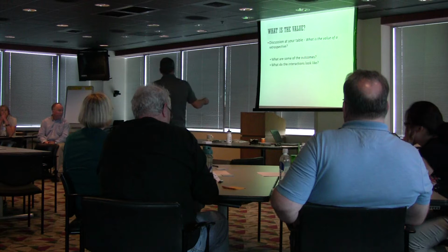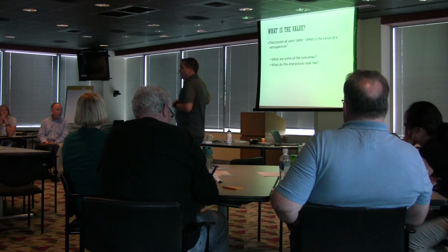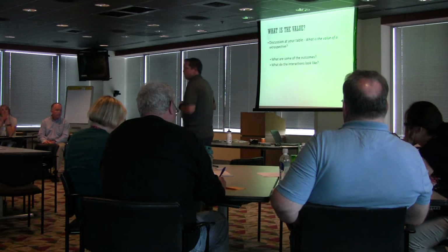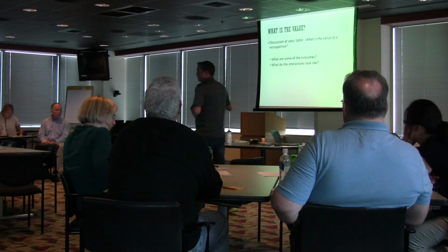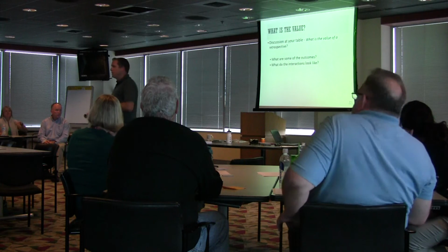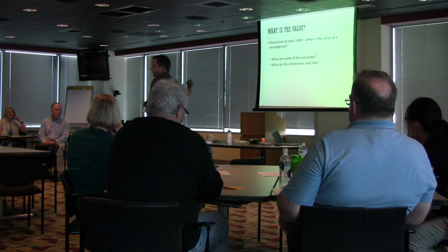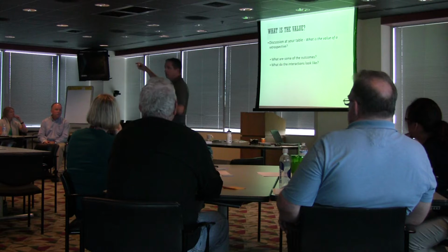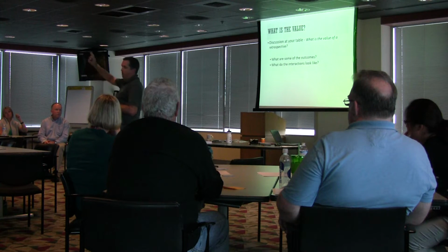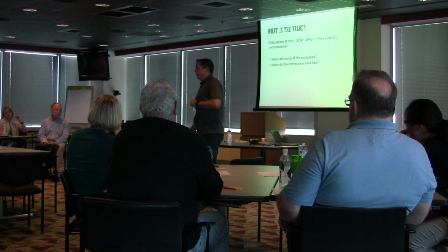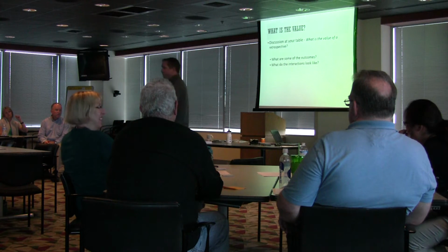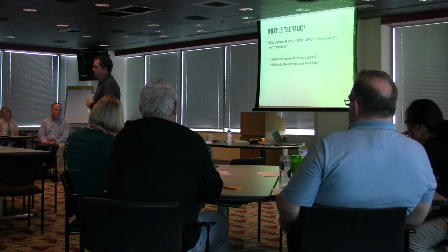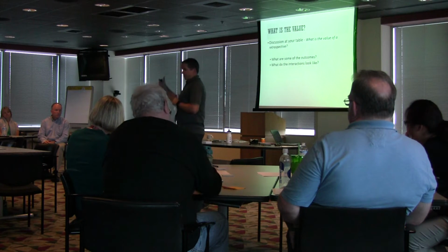Yeah, what I wanted to hit on is some of the outcomes. If you don't come out of a retrospective with one or two items to work on, the retrospective probably wasn't very fruitful, right? The other piece of that is actually working on it. Because I see that happen too, right? We talk about this is really important to us, so let's work on it. Yep, awesome. We're going to work on it. We go to the next retrospective and say, hey, we're going to need to work on that thing again. Well, what did we do last time? Well, we didn't do anything. We're busy. We're busy with other stuff, right?